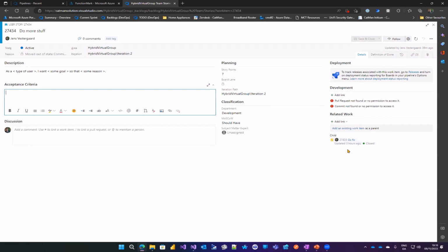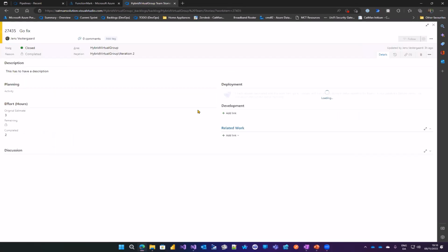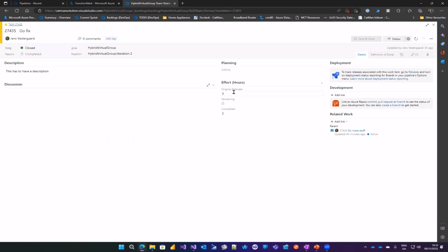In this one, there is a single task, where it's common practice to actually break down the tasks in your work so that it's fairly sure that you can actually achieve what you set out to in that specific amount of time. In our setup, we have to provide an original estimate. That would be, is this a huge task or is it a light task? If it's a light task, then we can go and register it. If it's somewhat unknown and therefore the developer doesn't really know how much time it will take, then you have to break down into smaller pieces.